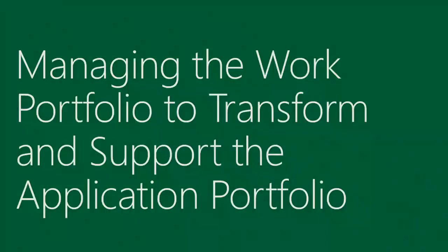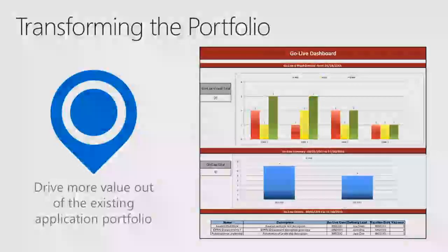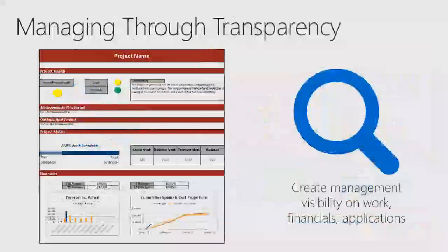So, managing the portfolio, transforming the team, and application support. These are reports that we review on a weekly basis as a leadership team. These are go-lives: as we have projects that go live, who's going live this week? Then we do projects we call entry-exit: what new projects came into the system, and what projects are closing out and leaving the system. And then we have the normal health, red, green, yellow, that you can look at. What's the spend, burn down, and all this is available to the customers to see at any time they want.